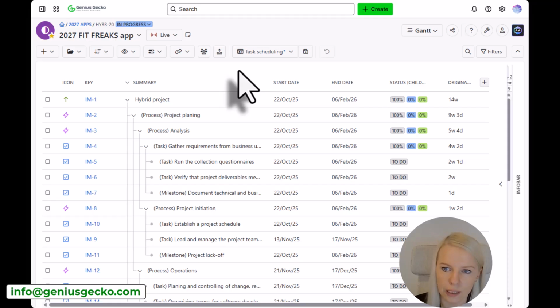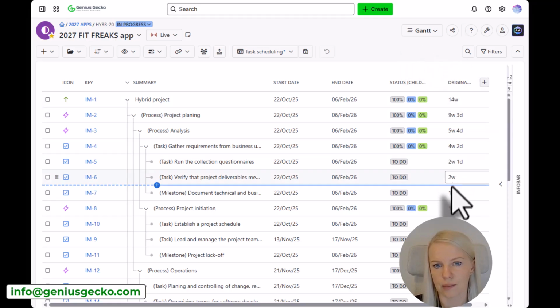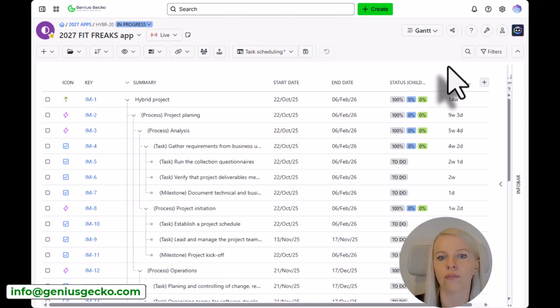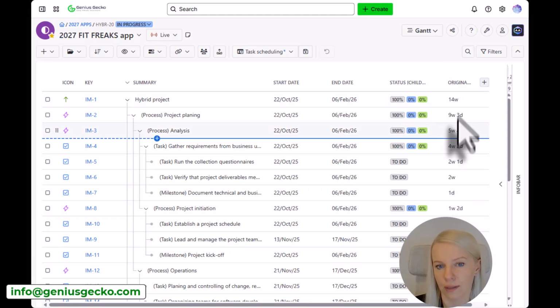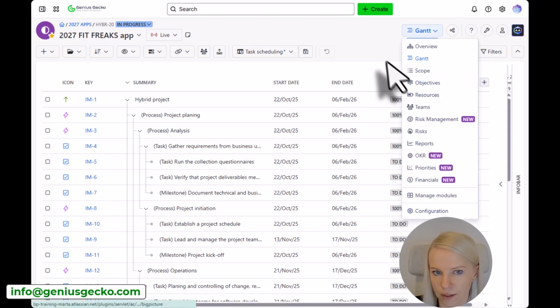If your holiday plans, workload schemes aren't configured correctly in the administration panel within BigPicture, those elements, those bars in the resources module, those estimates are going to lie to you, right? And at Genius Gecko, we see this all the time. Companies are buying the tool, but they don't really implement the process of estimation, capacity management, adding everything that is required there, right?